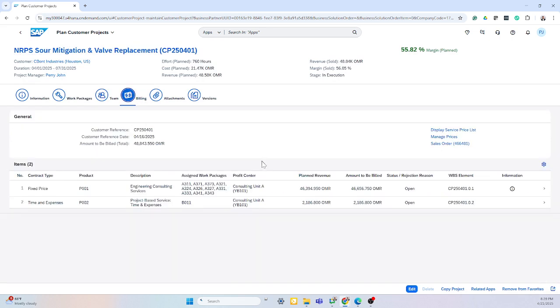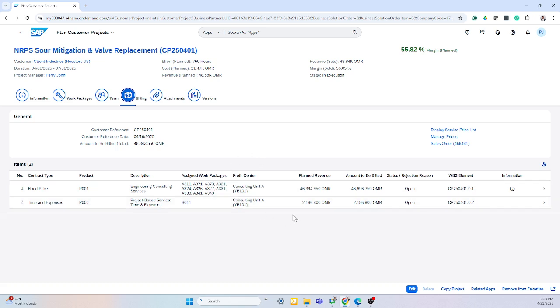Here's where we set up our statement of work. Again, whether that's fixed price, time and expenses, or milestone billing, these are the elements that would go on your statement of work. And once that's sent out, the statement of work is automatically linked here for any change orders.